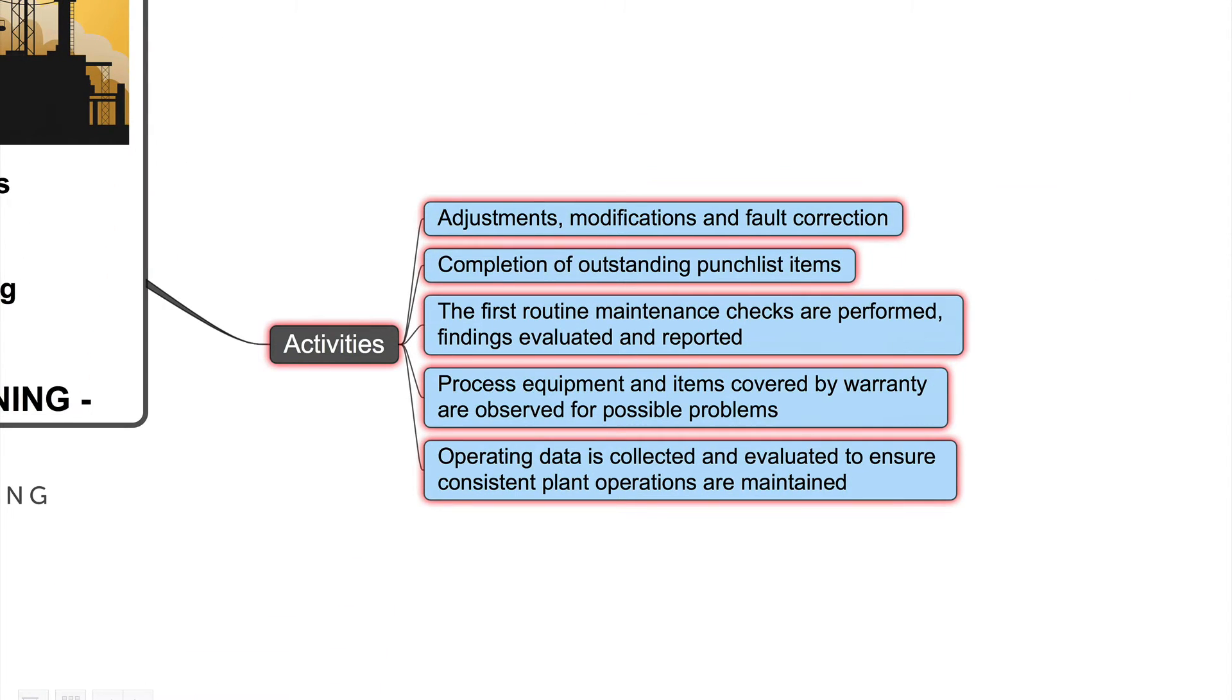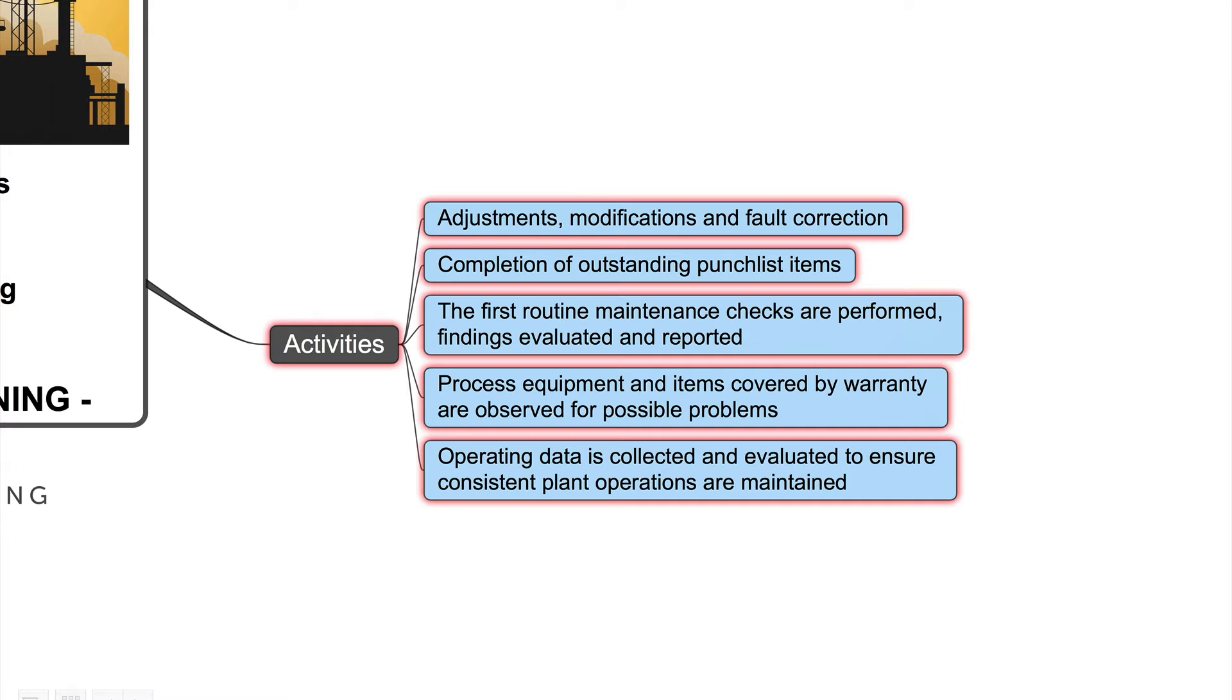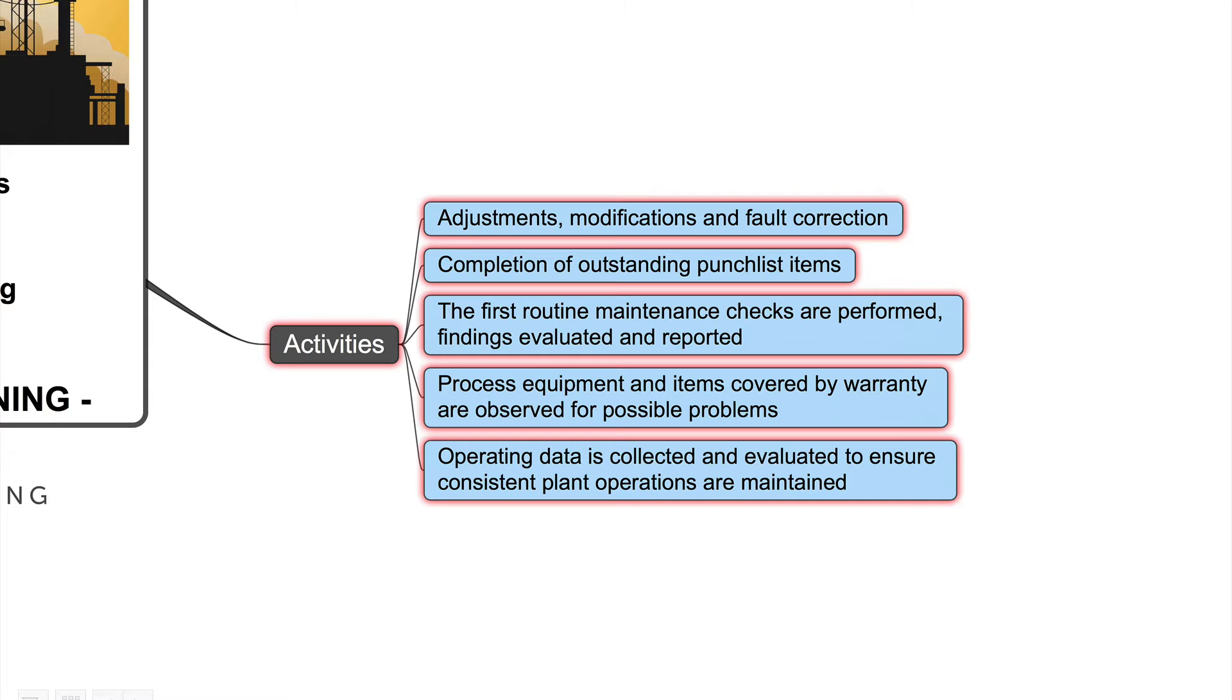Typical activities: adjustments, modifications and fault corrections. Important completion of outstanding punch list items and the first routine maintenance checks are performed, findings evaluated and reported. The process equipment and items covered by warranty are observed for possible problems and operating data is collected and evaluated to ensure consistent plant operations are maintained.